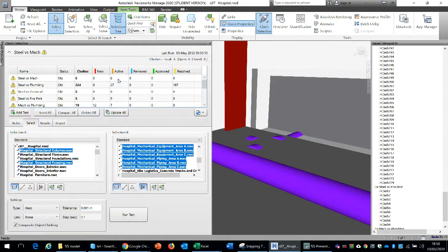So the whole idea here is to think before you start the production. So if these sort of issues could be highlighted earlier on, we would not have a need for so many requests for information or change orders emerging during construction work, and as a result of this, consequent delays.